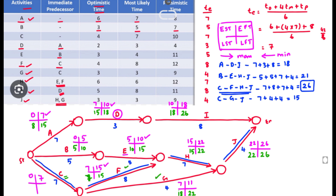For activity C there are two succeeding activities, F and G. The LFT of the current activity equals the LST of the succeeding activity — LST of F is 7 and LST of G is 18. Going backward we take the minimum, so LFT of C = 7, and 7 − 7 = 0. These are the EST, EFT, LST, and LFT values.